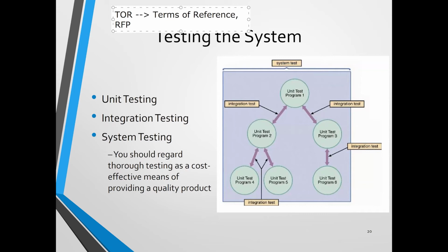is testing of the system. And testing of the system here is not just testing a program, it's the whole system testing. But you need to have 3 steps of testing. The first step, unit testing, each programmer does it by him or herself. Integration testing, when you join or when you integrate